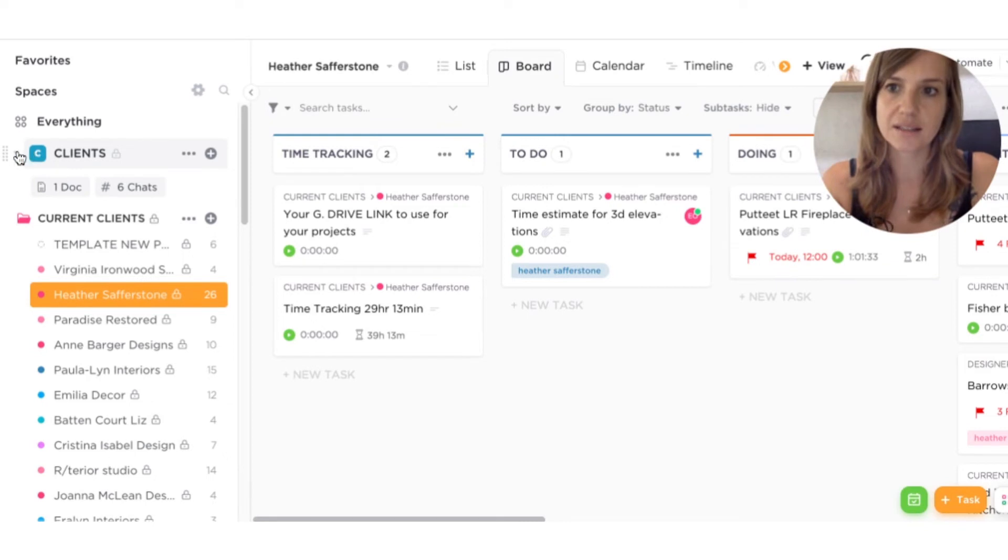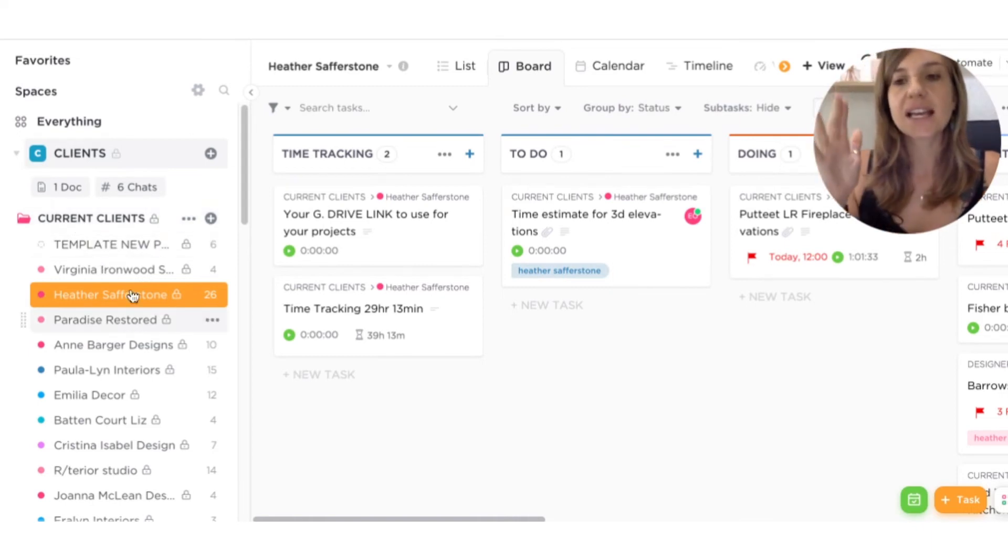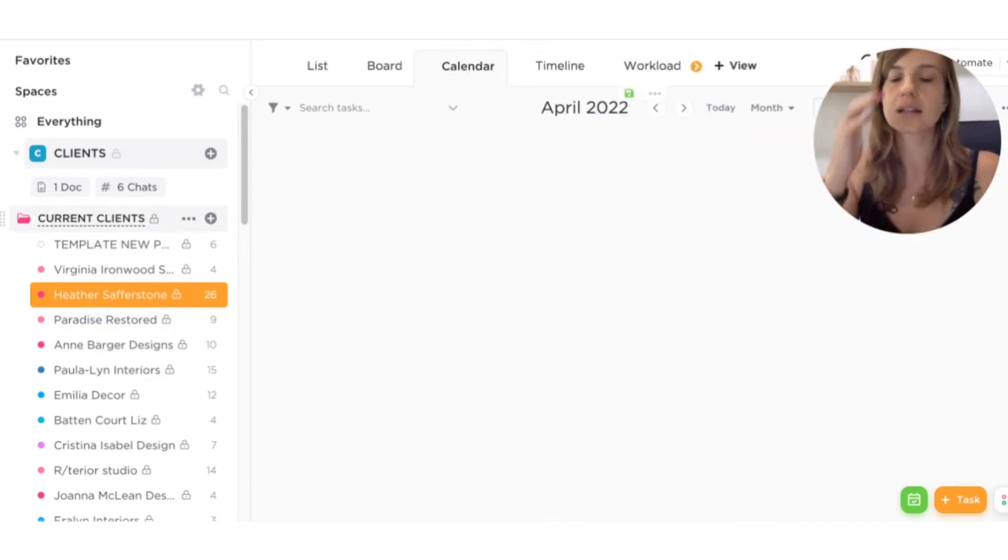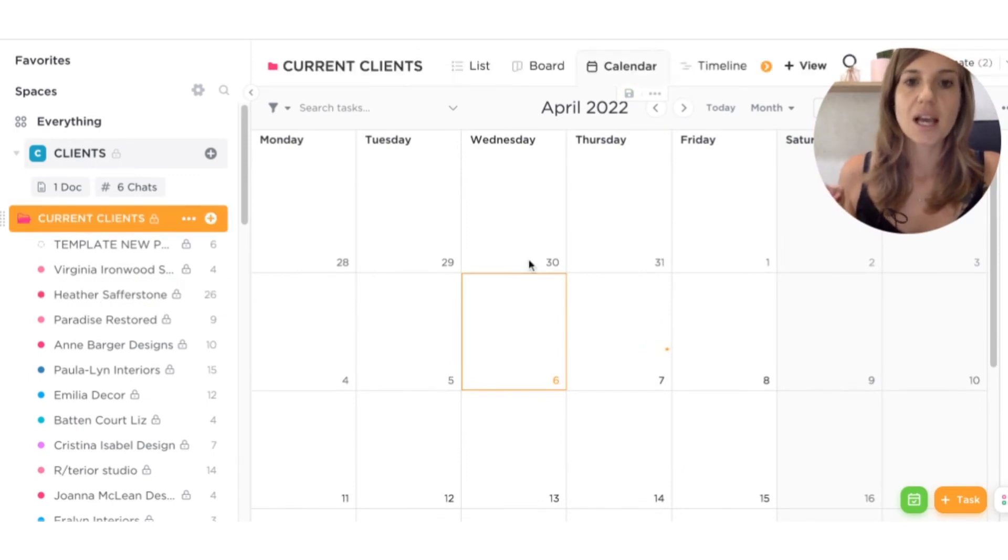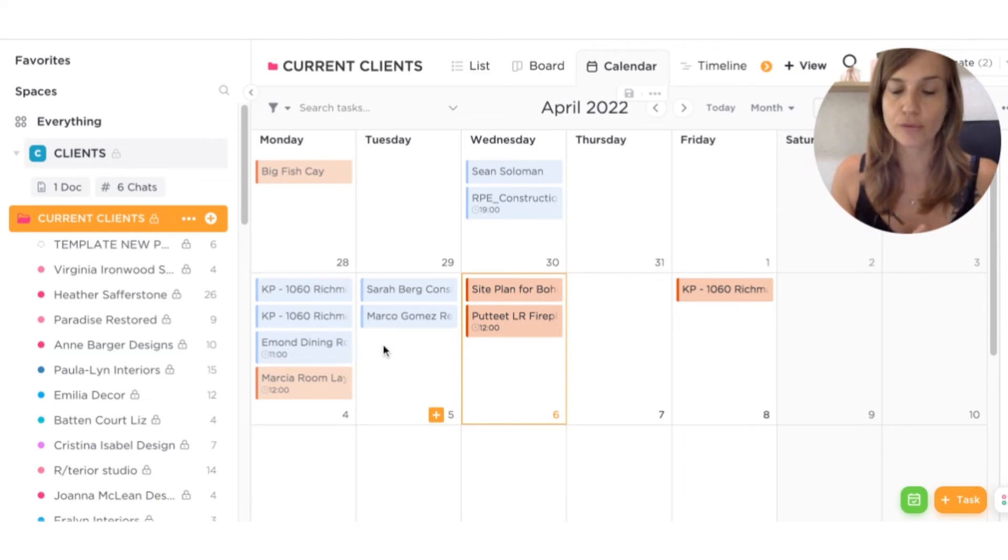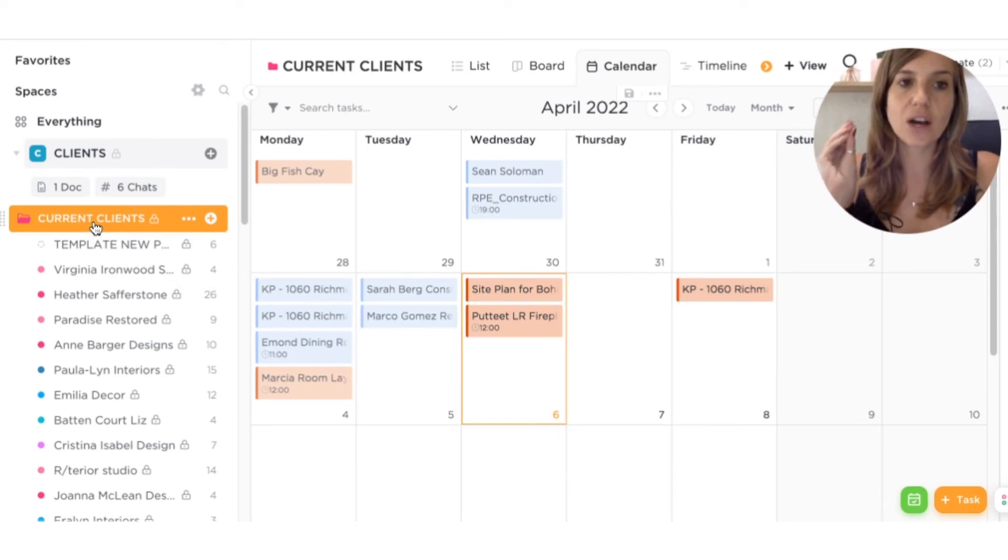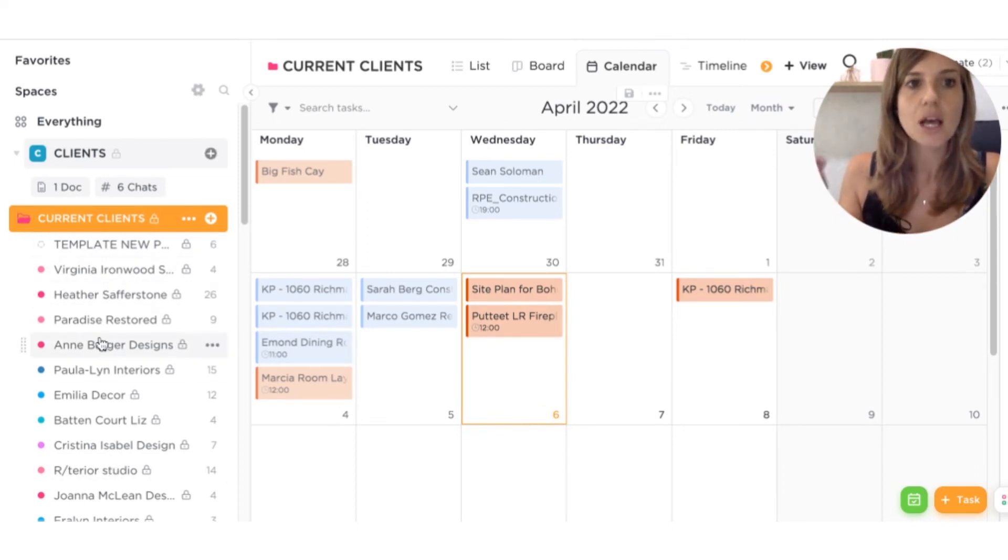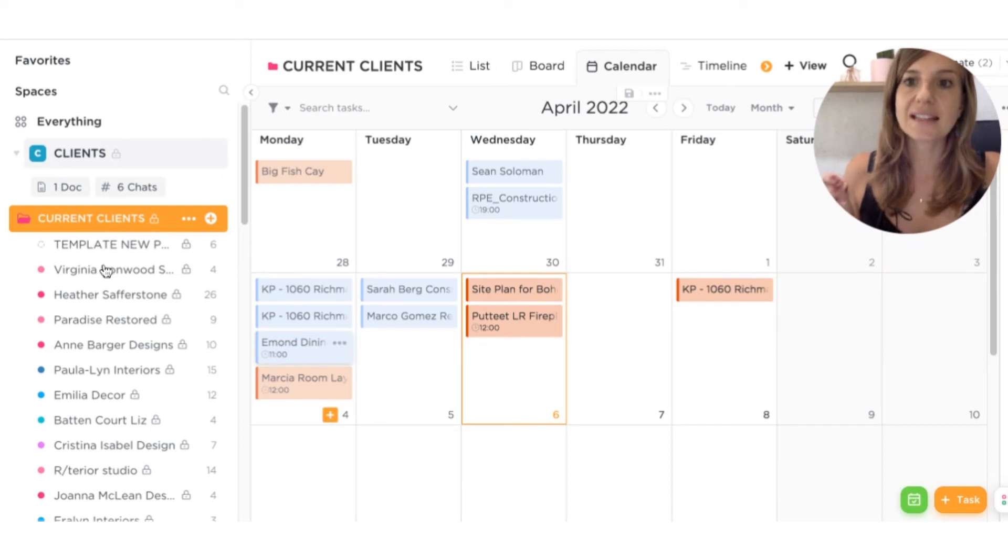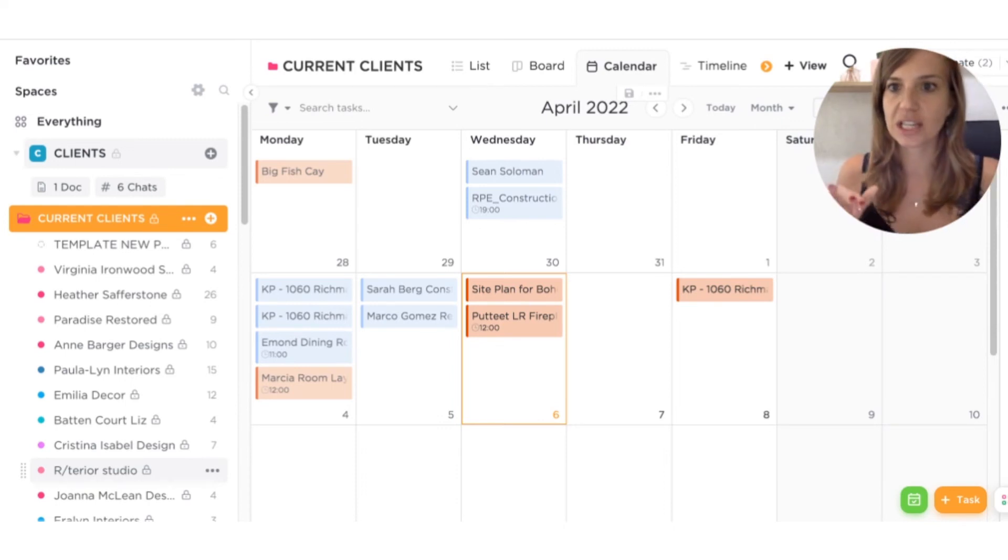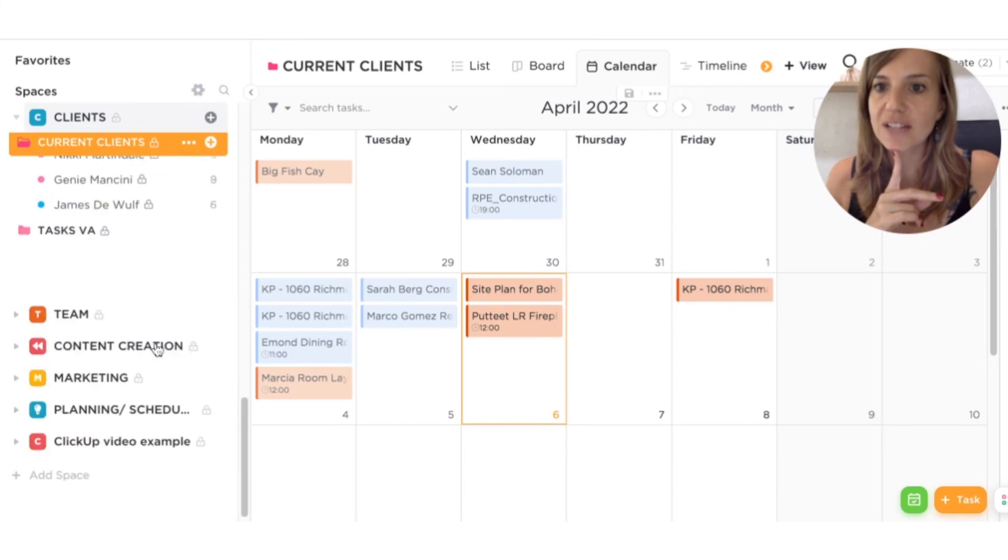Dashboard is clients, the space, sorry, it's not a dashboard, it's a space, it's called clients. Then I have a folder called current clients, and then each client is a list. And the reason why I've been doing it like this is because when I click on current clients, so the entire folder without going into a list specifically, then I'm going to see the calendar for all the clients. And I will know for each day, all the deadlines that we have for the entire team. So for all my clients, these are the ongoing projects. And I only have to click on the general folder to have this general view, which has been amazing because you can go into specifics, but every day you don't want to have to go into each list to know when the due dates are. So it automatically adds all the projects to this calendar. And this is why I've been able to do it this way. Because instead of having one folder per client, I have a general folder, and then I have a list for each client. So this is very important.